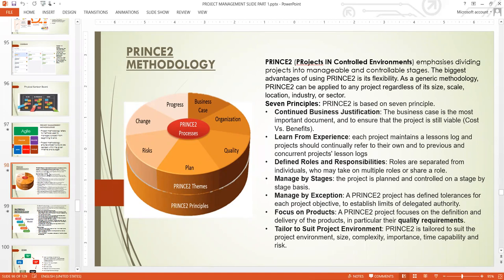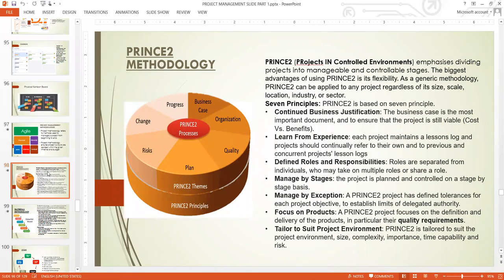PRINCE2 manages by exception. It has defined tolerances for each project objective to establish limits of delegated authority. There are some things you cannot delegate as a project manager — you must do them as best practice. There are some things you cannot delegate to other project team members; you must do them yourself. That is their role in PRINCE2 — that is how PRINCE2 manages by exception.